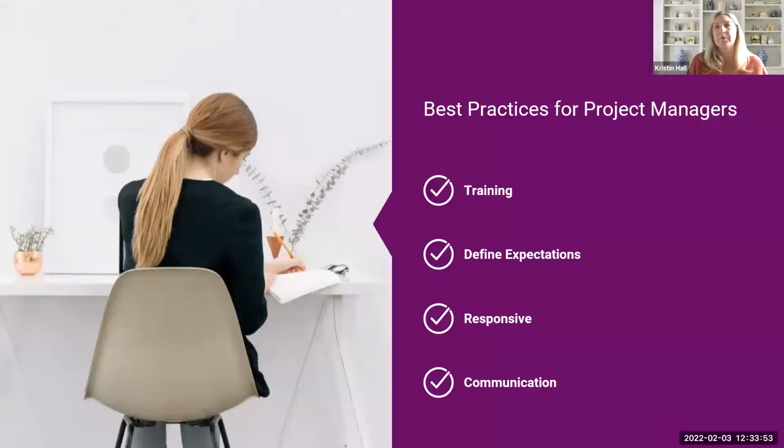One other pain point I'll point out that we've had to adjust to is that some of our projects are due shorter than 2 weeks. So if we have a client that needs a project turned around in less than a 2-week period of time, how are we managing that within the sprint when we're only having those planning sessions every 2 weeks? And so we've just built that into our morning stand-ups. We identify those due dates in monday.com and then just approach those in the team.